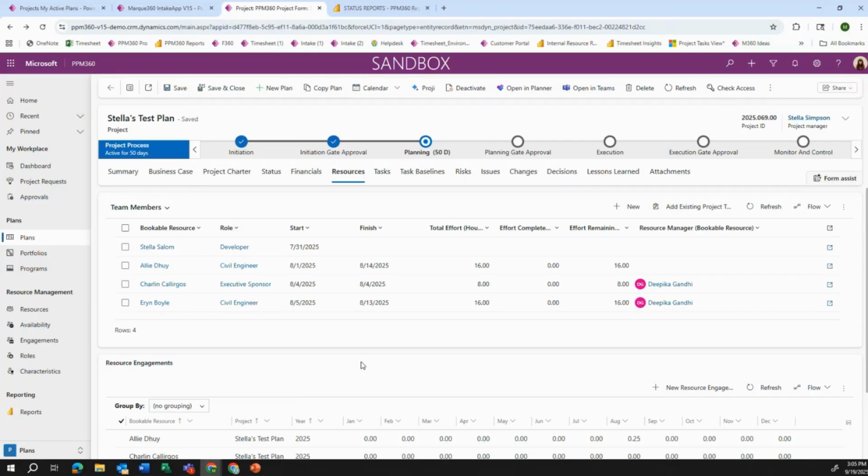My resources tab here is very important. It's going to show me all of the resources that are assigned to this project. These resources get assigned by being assigned to tasks, or I can simply assign a task to my project. We can see here that I also have role, which is going to be key because this role can actually be added as a filter on my resource reports. And I can narrow down, for example, on my reports, such as how are my developers doing this week, and figure out what the developers are assigned. This is very useful to project managers and resource managers as well.